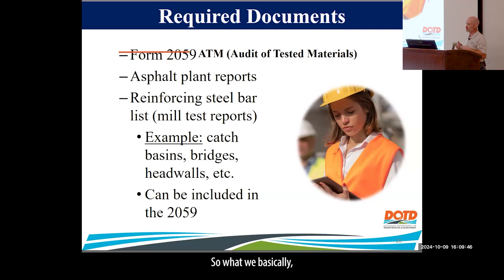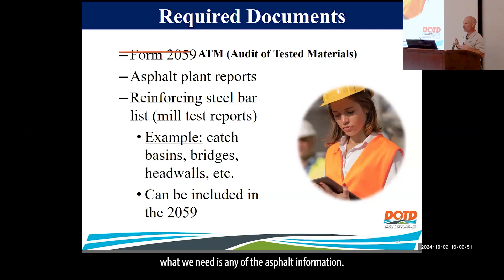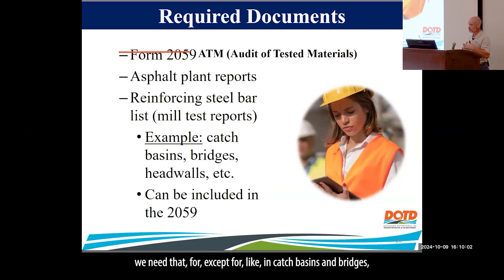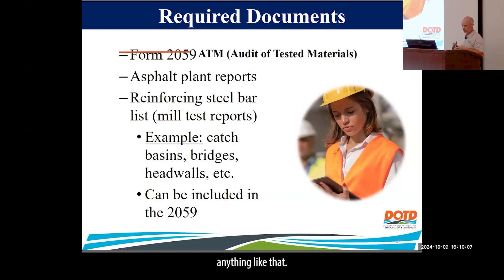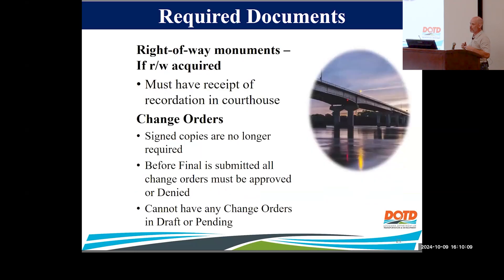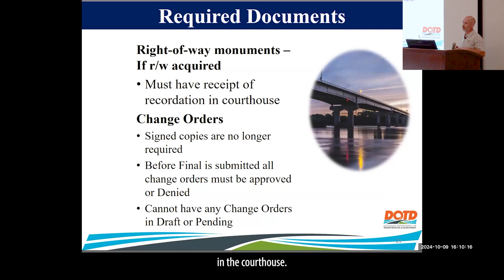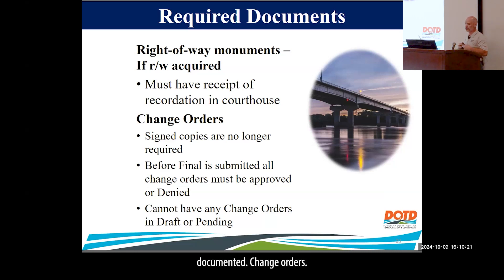What's in the 2059? We need any asphalt information: plant reports, roadway reports, job mixes, anything like that. If there's any steel being used on the project, we need that — except for steel in catch basins and bridges. If any right-of-way was acquired on the project, we must have a receipt showing it's recorded in the courthouse, along with the map and plat map where the new right-of-way was documented.